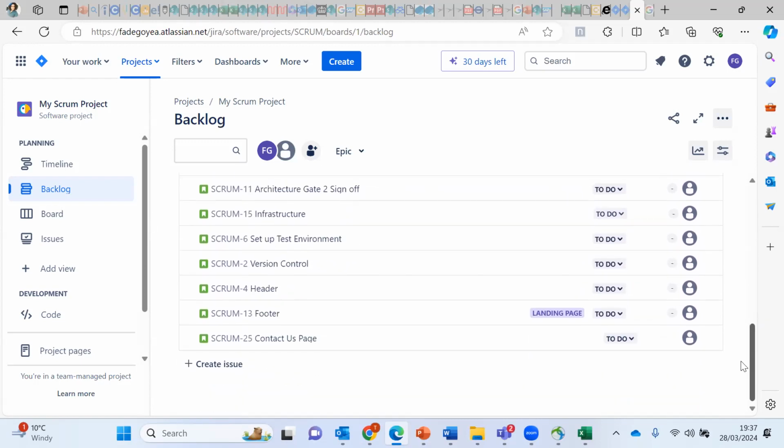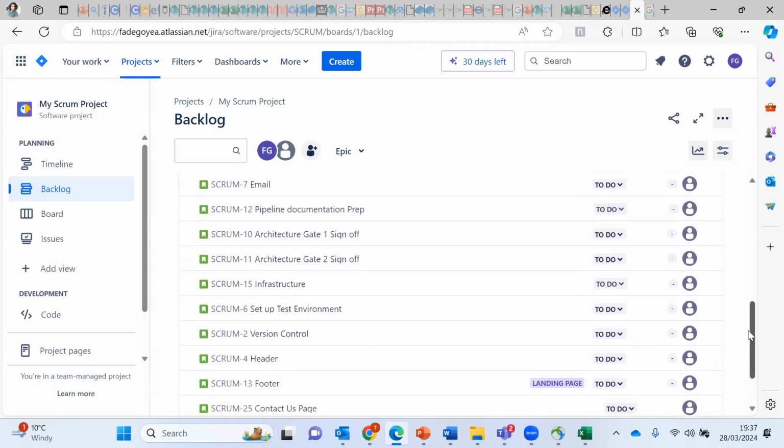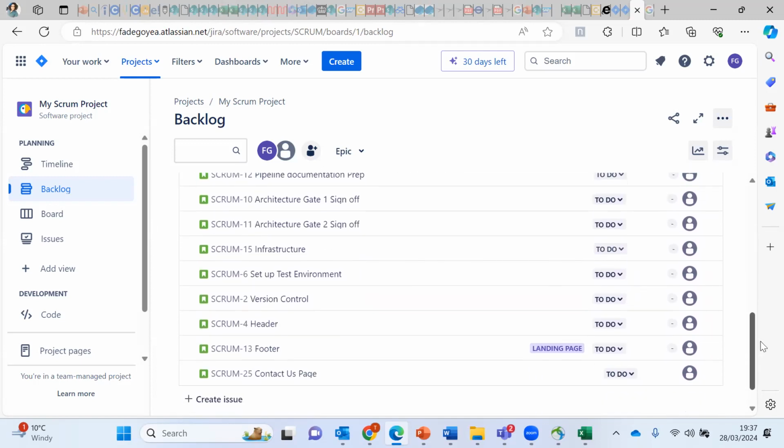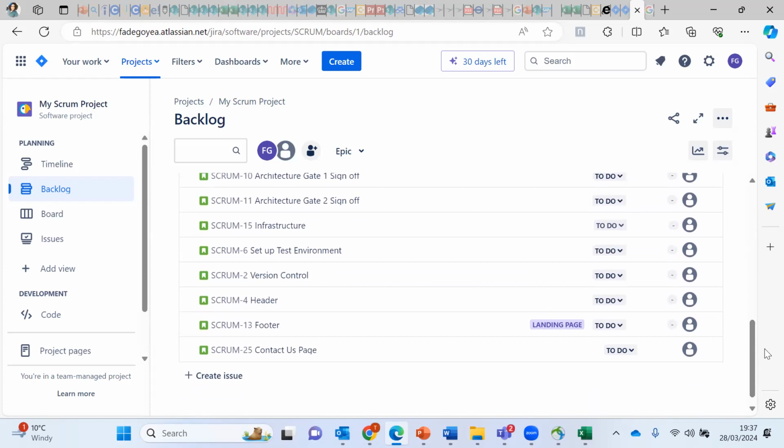Okay. All right, cool. Now let's say we've created all of these stories on the call today. I'm just trying to make sure that we get through as much as we can on the call. And I want to link the stories to an Epic because, of course, if anyone comes on your board for visibility, you want to make sure that they're seeing your stories linked to Epics. This is the only one that has an Epic linked to it, right? But I'm seeing the stories in your backlog that are not linked to any Epic. So I'm not sure what Epic these stories are linked to. Now, what I want to do is link the stories to an Epic.